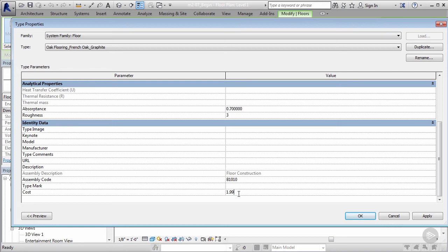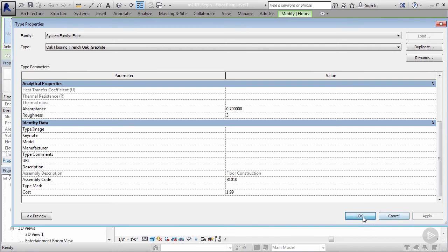Now I can just click in here—we're gonna say that that floor cost me $1.99 per square foot. As I mentioned before, if you wanted to do material and labor, we could do a rough estimate by adding what we estimate the labor would be, but we're mainly focusing on material at this time.